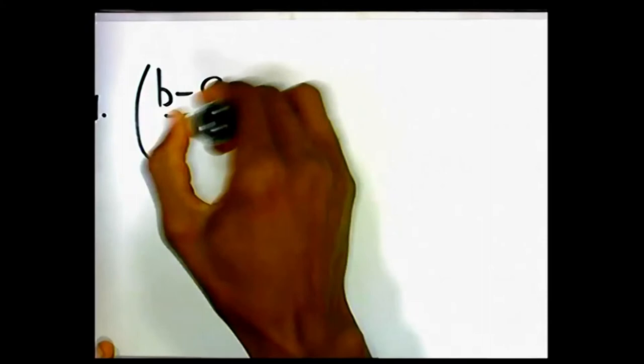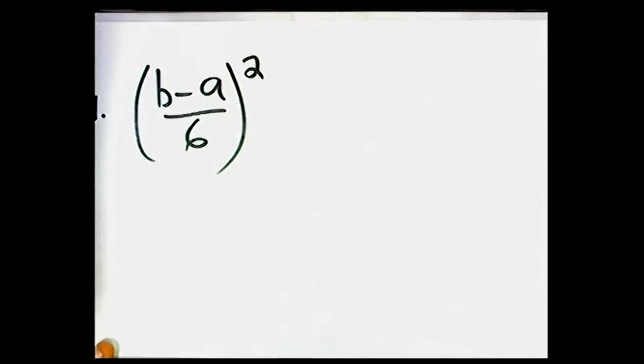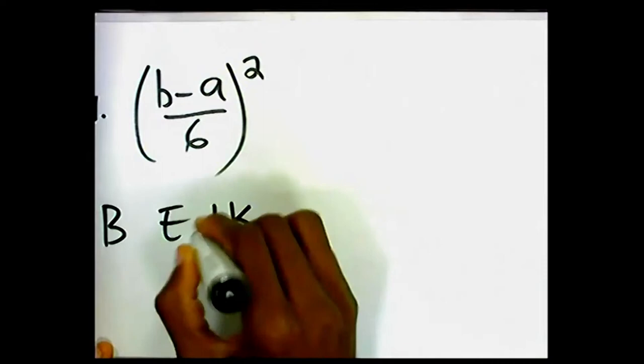So the only thing we don't have now is our standard deviation. And so all we're just going to do is, this is the formula to find the variance. We stated that b minus a all over 6 squared. So you just have to go for our critical activity, which was I think it was B, E, I, and K.